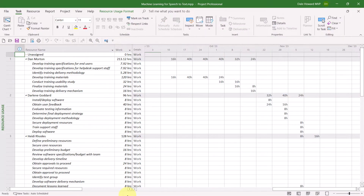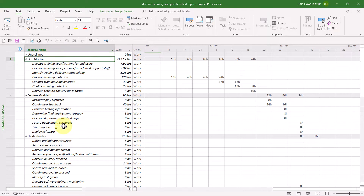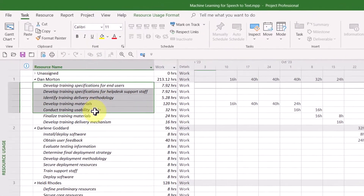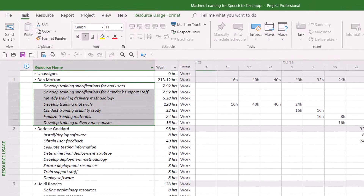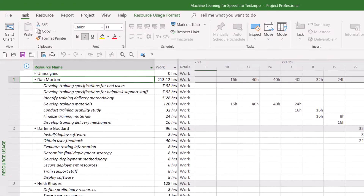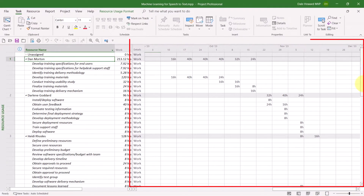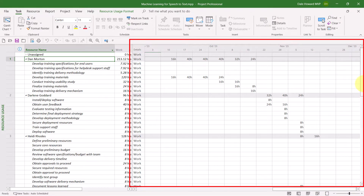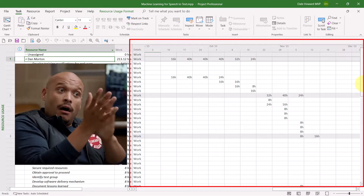The Resource Usage view is so cool. In this view, you can see the name of each resource. Below their name, indented and italicized, you can see the name of each of the tasks to which they're assigned. And over on the right side of the screen, you can see a timesheet-like grid known as the Time Phase grid that allows you to see items like work or cost phased over time.